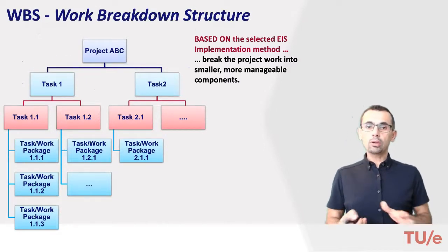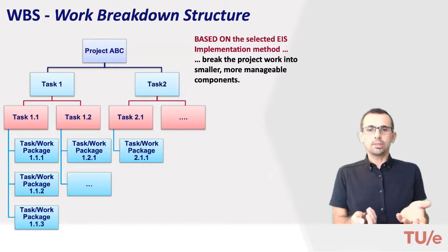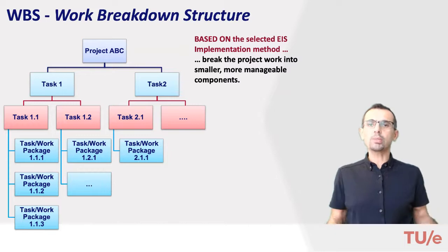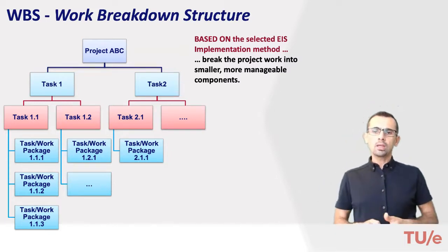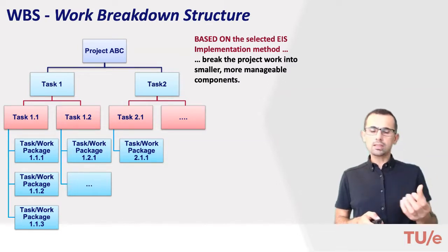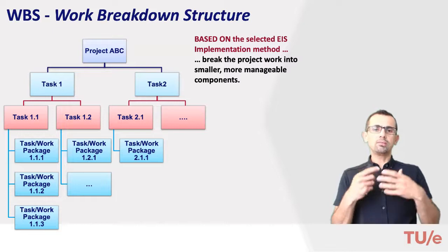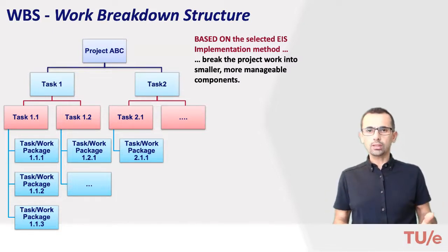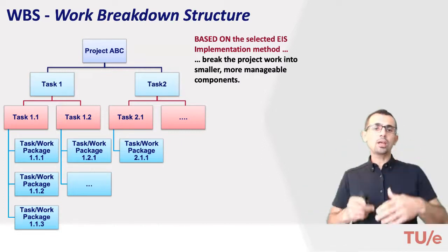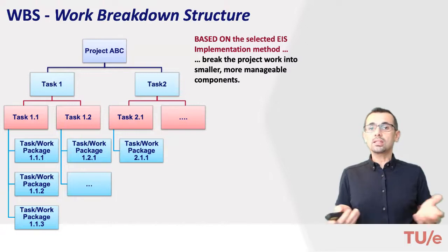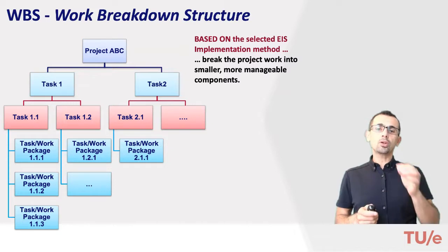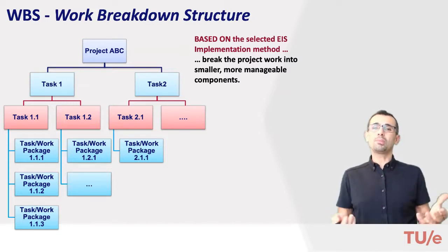Now, work breakdown structure is a breakdown of a project into smaller components, let's say. So these components are typically tasks, and the WBS, in short, work breakdown structure, is rather a deliverable-oriented or output-oriented thing. So it's not a process model, but it's a tree-like structure, and so that's hierarchical, in fact, in terms of structure. You typically determine your project main components by adopting a system implementation approach.